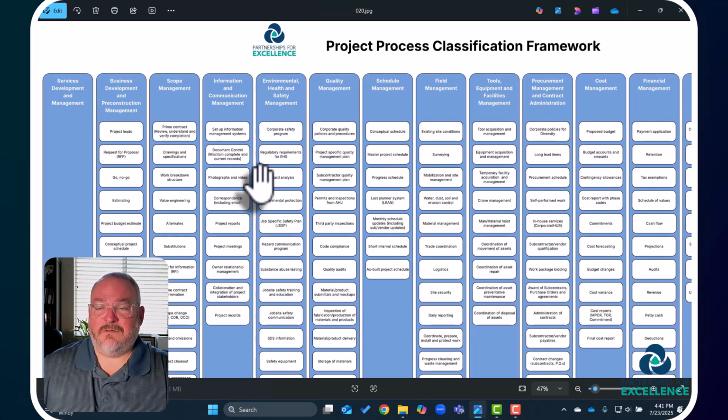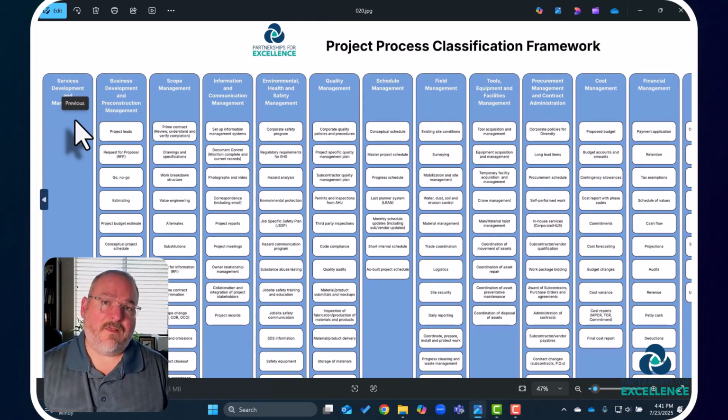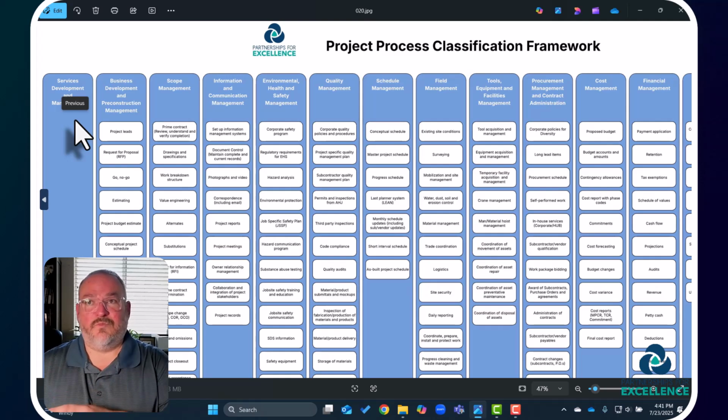So this is how you would do. You would test it out at a project level and then verify that it is working. And then once it is working and you've proven that, then you're able to modify your existing documentation, your existing policy and procedure, existing training or process or whatever, or your database, the way you use the system, and then release that to the teams and then retrain them in that new way of doing things.